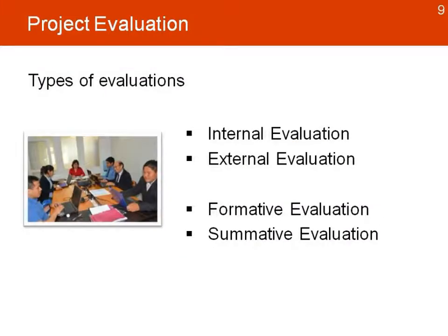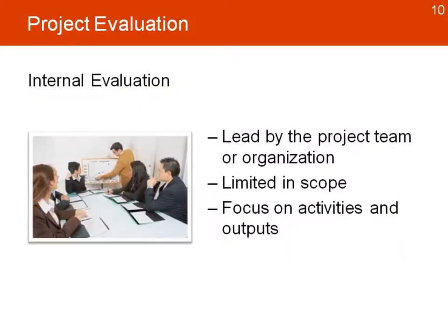Let's look now at some types of evaluations. Internal evaluations, external evaluations, and then formative evaluations and summative evaluations. Let's go with the first one. What is an internal evaluation? It's usually led by the project team or a team or unit within the organization. It is usually limited in scope and the focus is on activities and outputs.